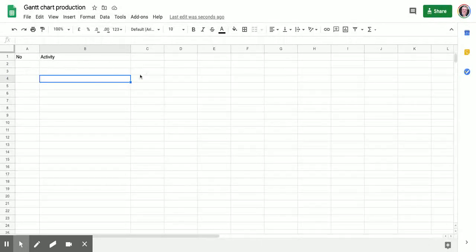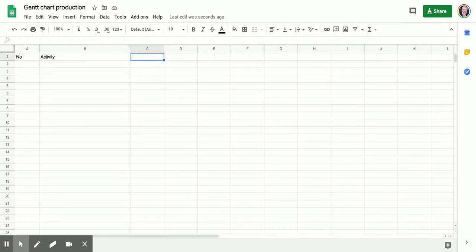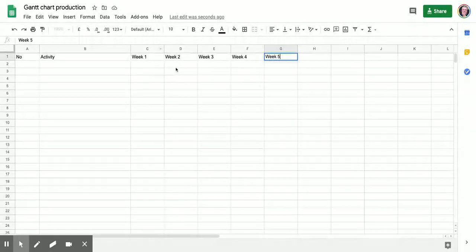There's the activity itself. Now, what I'd like to do, and we can split this up, for short jobs you can put these down to days, but I'm going to put down week. And we'll call it week 1. And then we'll call it week 2. And then so on, week 3. Week 4. Week 5, and so on, all the way up to the end of it. A good sized contract, 20 or 30 weeks easily. So we've now got an item in there.